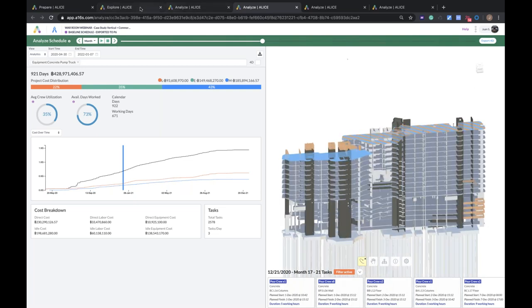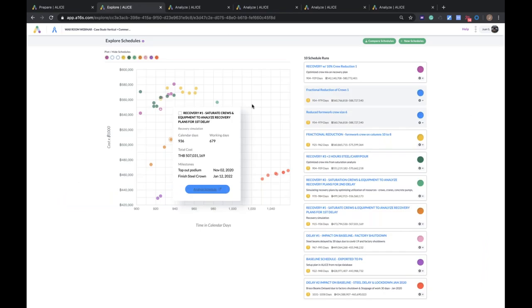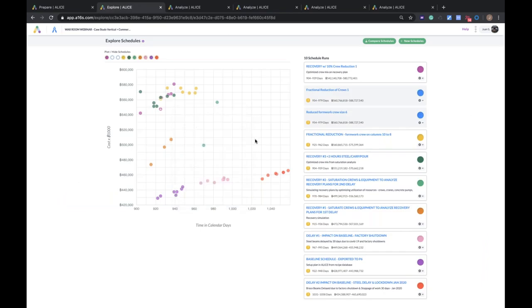The way that we calculate it is the amount of time that your crews are standing around. So if you bring a crew on site on Monday, and then they leave Tuesday, and then they come back on Wednesday, that Tuesday is an idle cost for your crew. So this is how ALICE optimizes not only your schedule duration, but also the cost of your project. Because it ensures that it reduces the amount of time your crews are standing around. Coming in, getting the work done, and getting out as quickly as possible. You can also identify the idle cost for your equipment. Is there a benefit to getting that crane off the job in five months instead of six months?